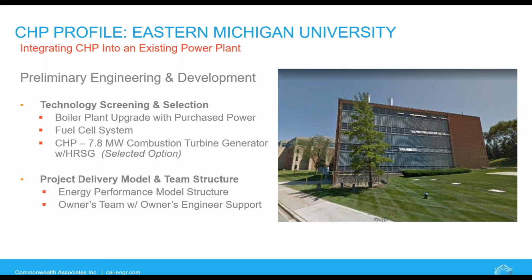To improve schedule, you may have to purchase the major equipment yourself ahead of bringing on a contractor and then turn over delivery and installation to them. So there are numerous types of contracts, and frankly, I'm a technical guy, so I'm not going to go into them all. But we definitely have people at Commonwealth that can support investigating the best contracting approach for you.